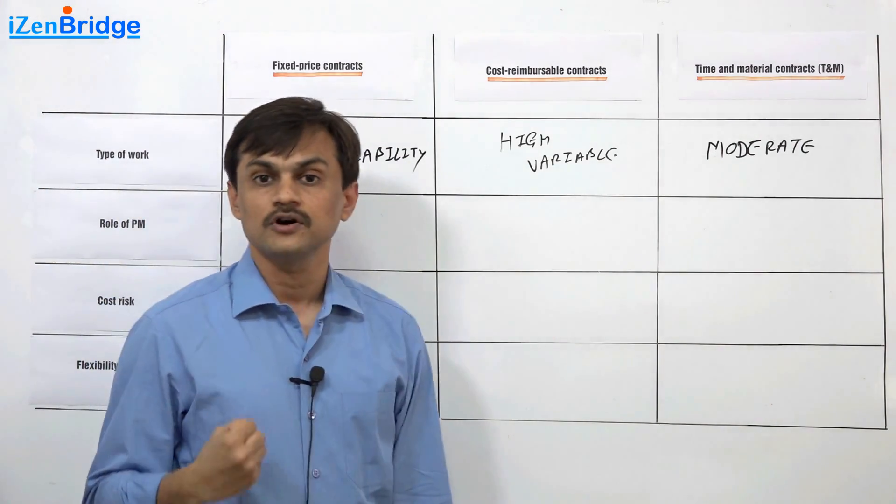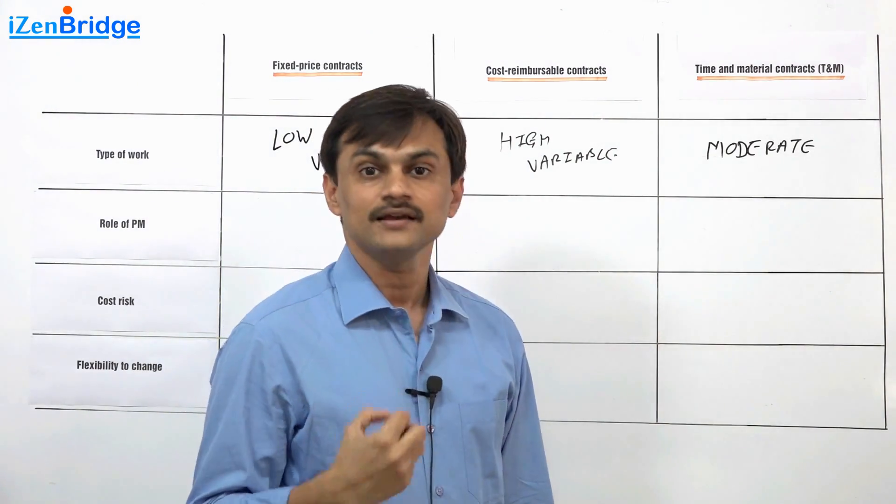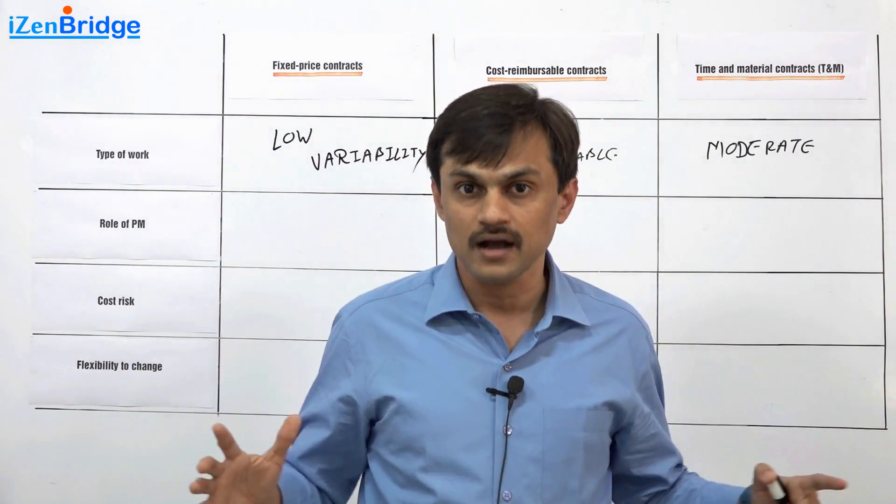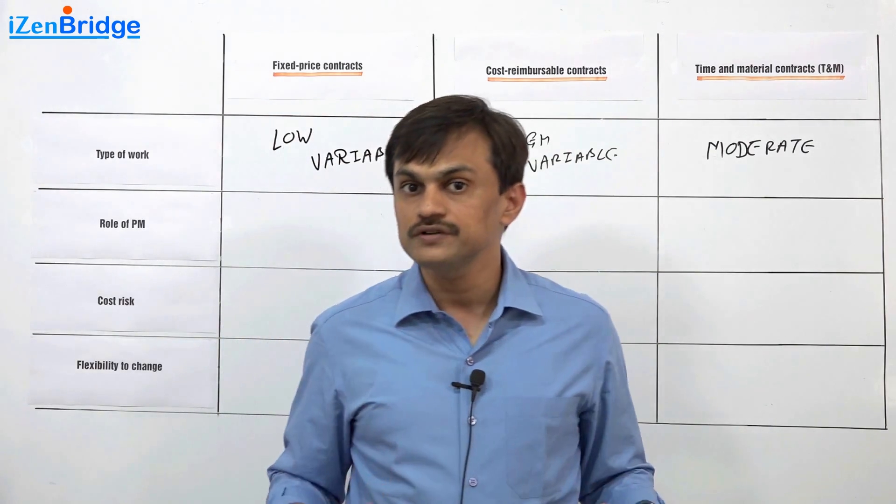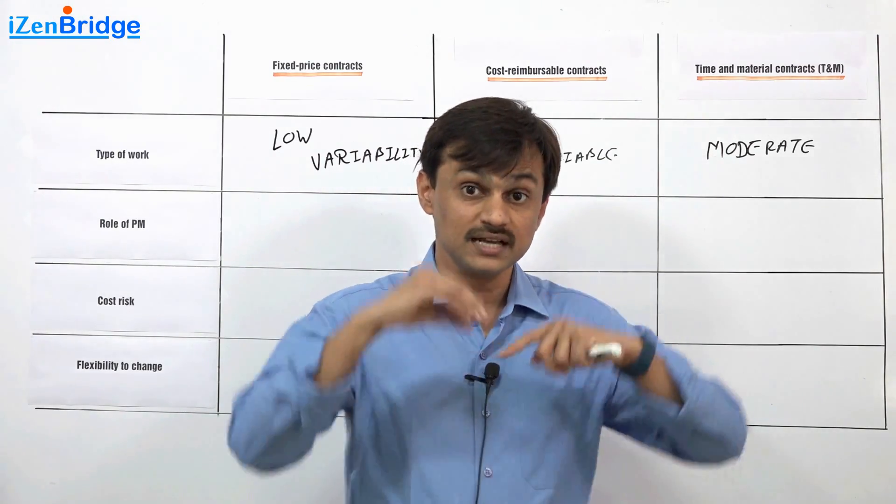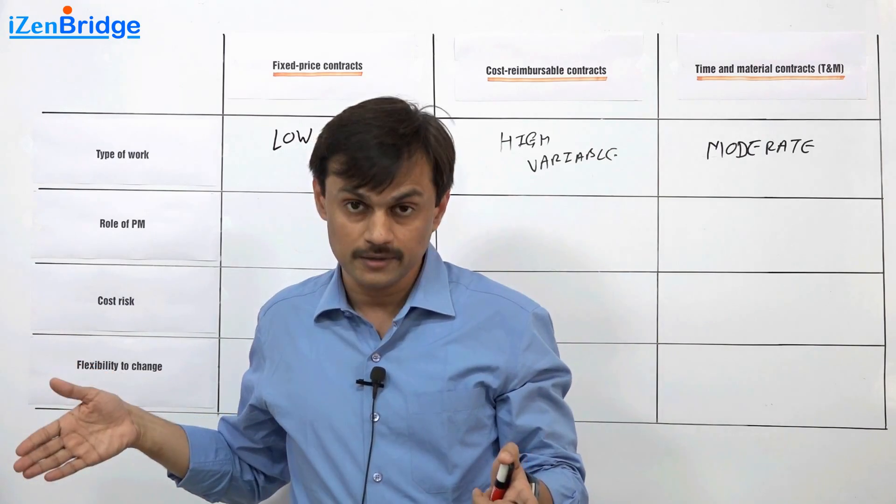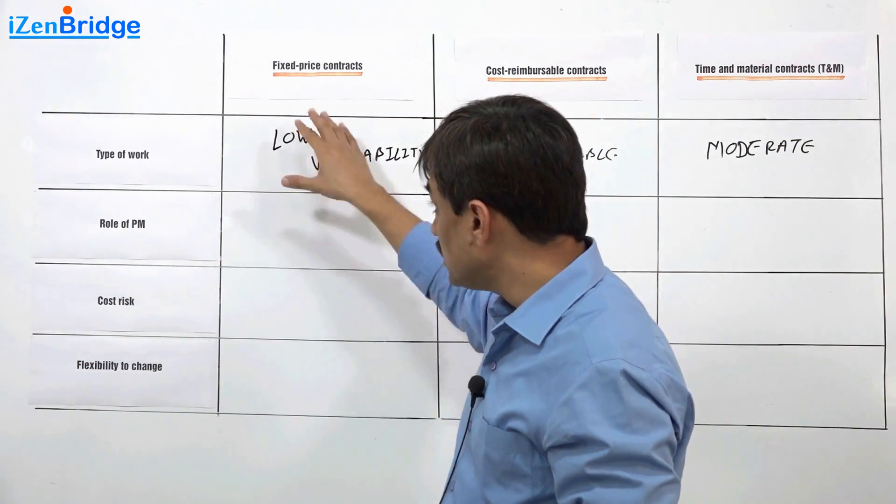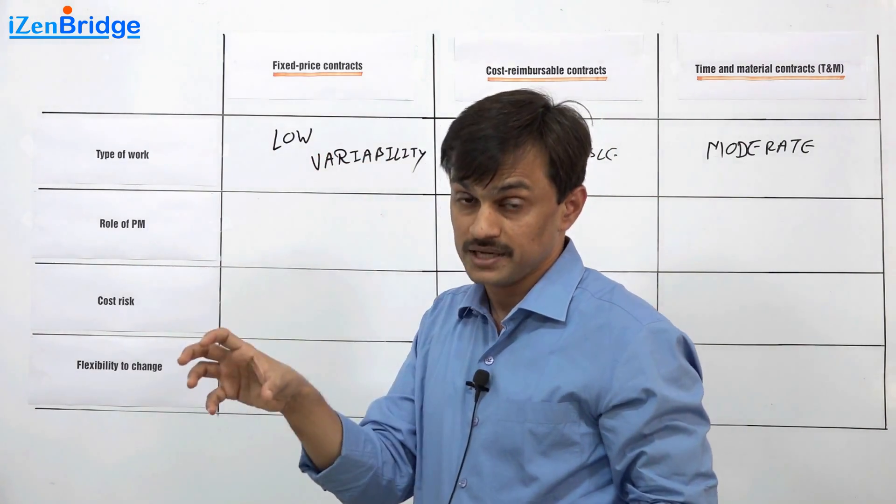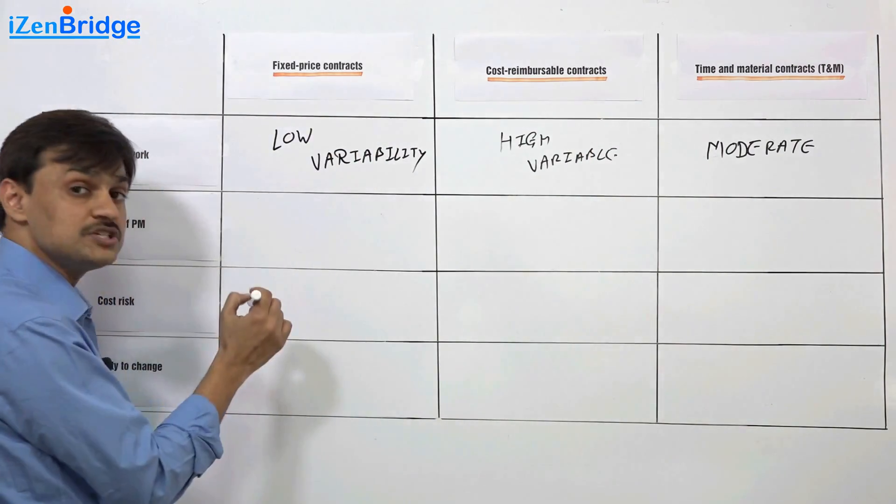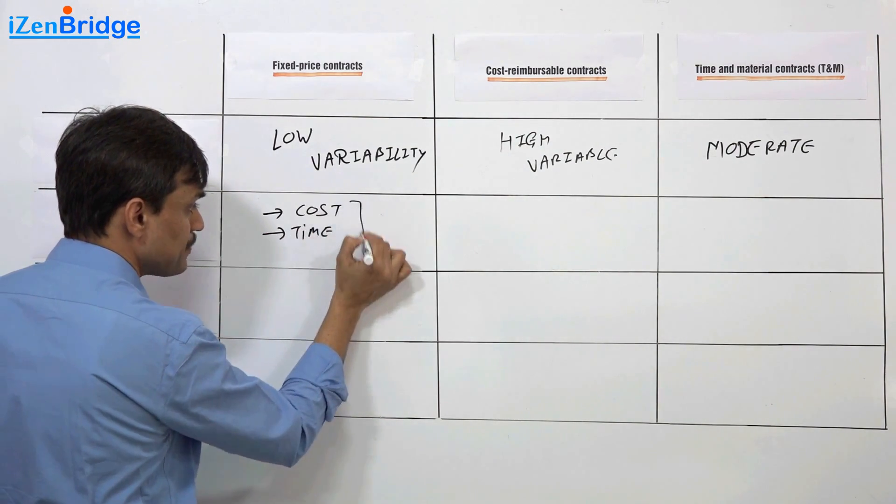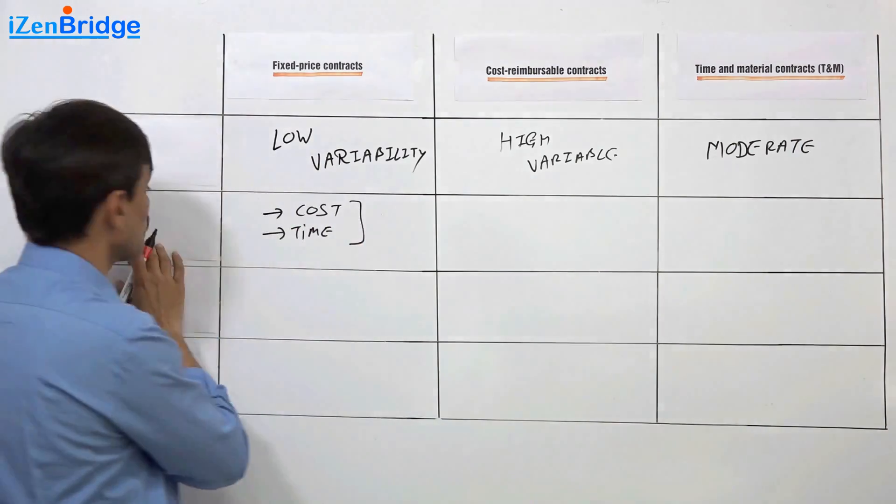When you are a project manager of a fixed price contract, you are managing a very accountable position. Your responsibility to manage everything in a cost is very, very high. You are the one who makes majority of decisions because your customer does not care what kind of things you are buying. Your customer stakeholder will not care about it. Your sponsor will care about it. The power in a fixed price contract: the project manager has full accountability of managing the project in a given price.